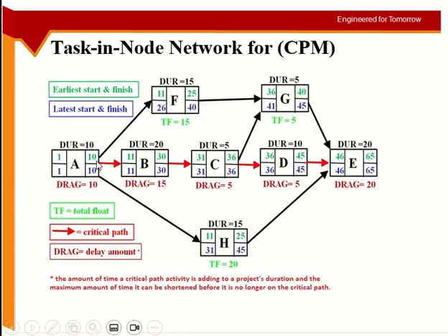Now you are not doing it literally, because day 1 is counted. Day 1 is the day when it will start, so you will start working on day 1, and you have to count day 1 as well. So you will not do 1 plus 10. You are doing basically 0 plus 10, because day 1 is counted in working. On day 1 you already started working.